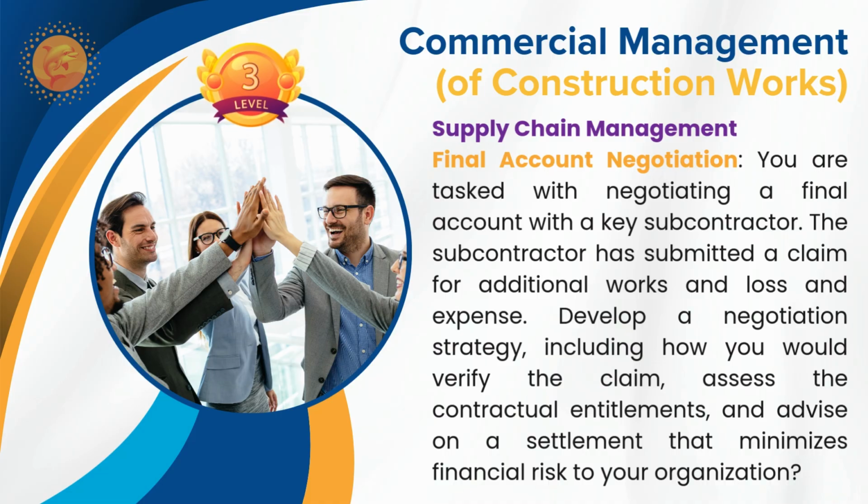If you are on a back-to-back basis, yes, you can encourage him to submit the same thing and you can add up your overheads and forward the same claim to your employer. And if it is approved by the engineer and accepted by the employer, then you can pay on a back-to-back basis to the subcontractor. Otherwise, you can clearly convey the rejection to him based on the response received from the other contractual stakeholders.